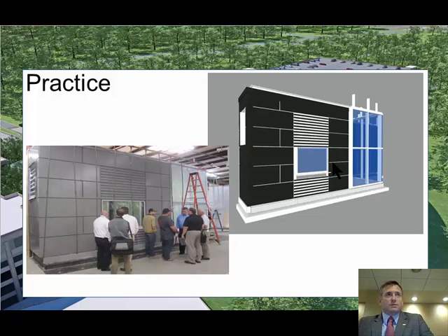Now, one of the other things that we did on this project is we practiced. Before we told them to go out there and model the entire building, we knew we had to do this mock-up. And so we didn't just shortcut on the mock-up or just tell them, hey, go figure it out. We had them completely model the entire mock-up for the project. And when they shipped out these pieces over to Texas in order to assemble this to do laboratory testing, they shipped out the exact pieces, sizes, and shapes that were going to be assembled. And we learned a lot while we were figuring this out.